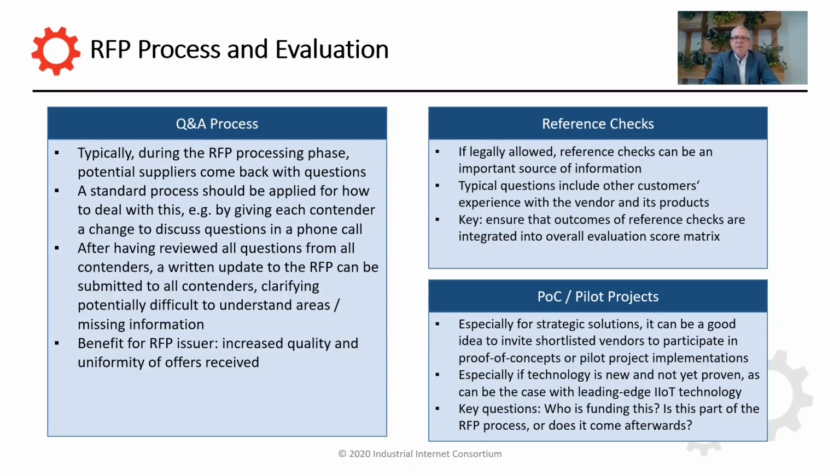First one is reference checks. If this is legally permissible, then this is a great way of checking how far the data provided to you in the offer that you have received holds up against the experience that other customers have had with the vendor and/or its products. It's also really important that what you learn through these reference checks is fed back into the evaluation score matrix.